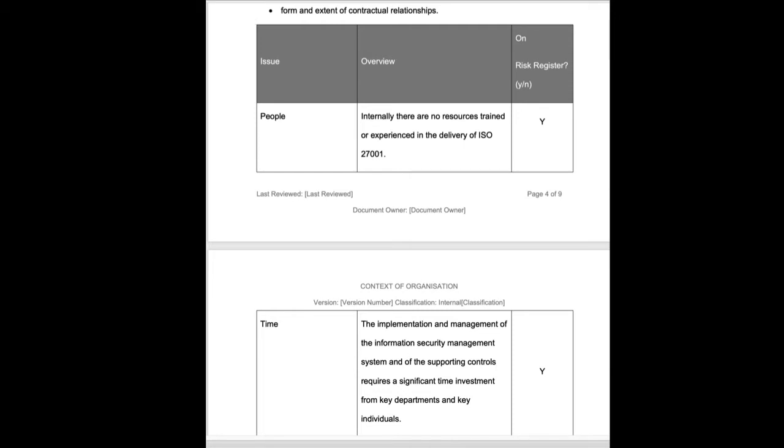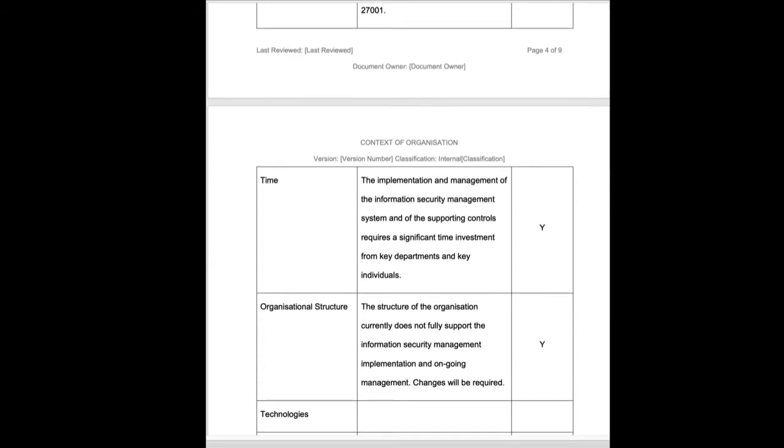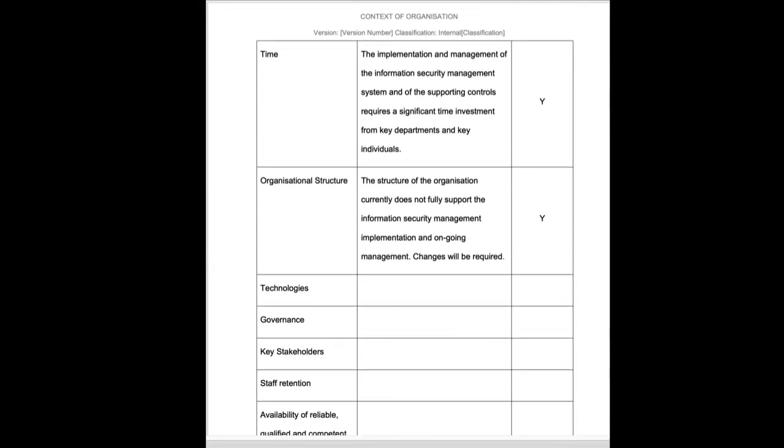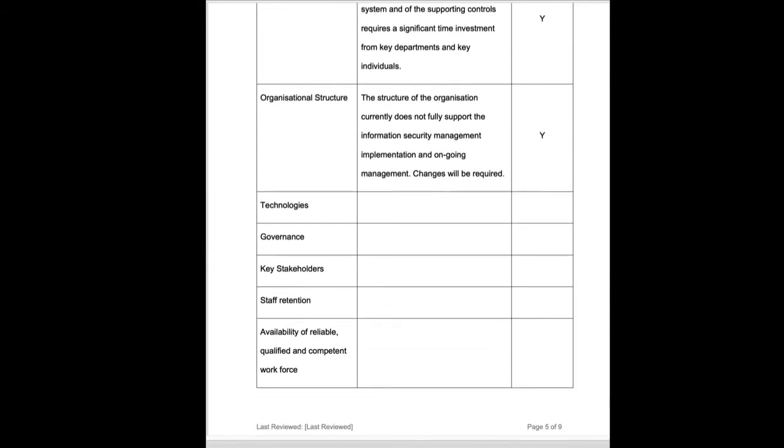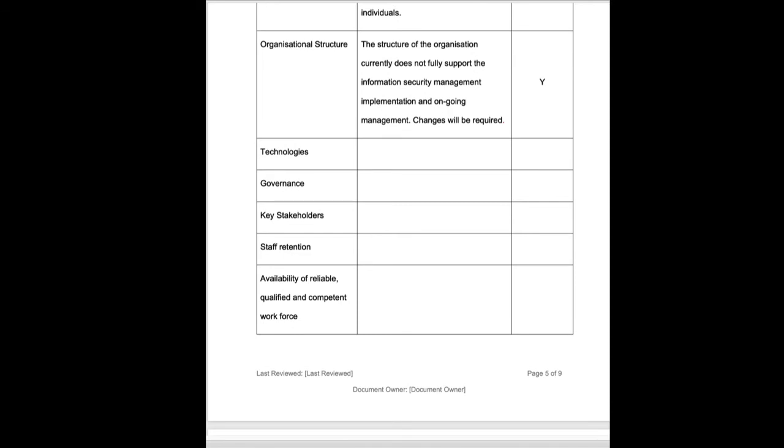We're going to consider things like time, structure, we're going to look at technologies. So internally are we using leading or bleeding edge or self-developed technologies? Does that require a risk item or are we looking at off-the-shelf packages and known, bought, stable technologies?